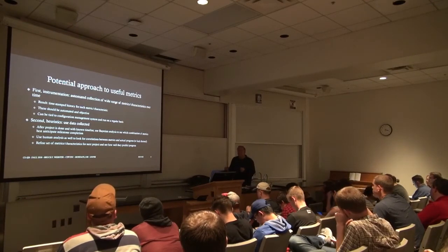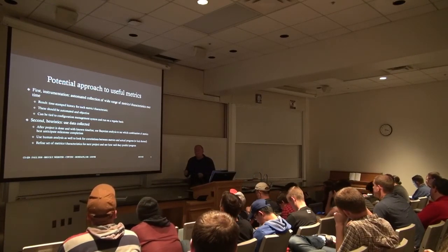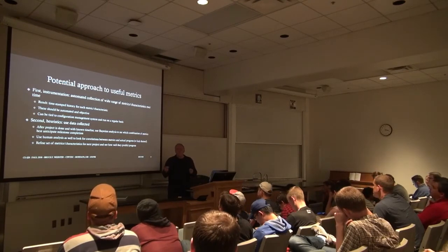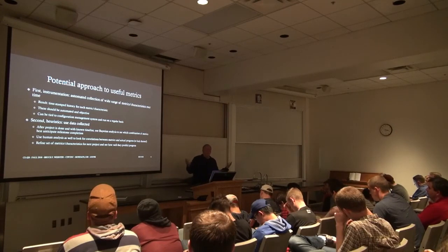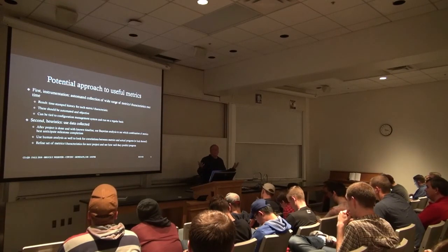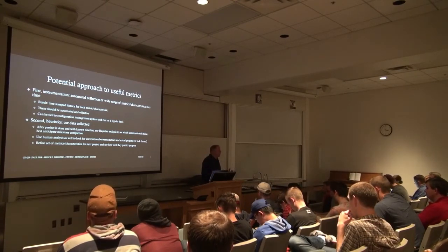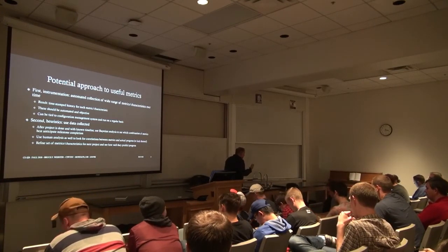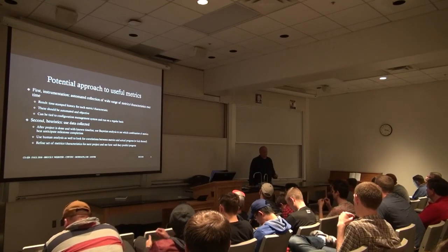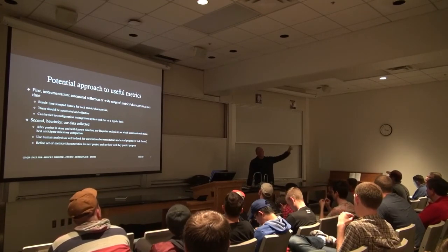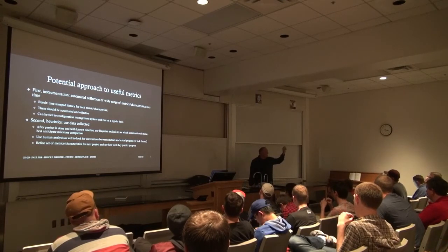Now, the priority says, how important is it for us to fix this before the next time? And that's usually a function of the impact on usability of the program and the frequency with which it happens. Yes, the whole program crashes, and this happens to me about once every 2 weeks. Okay, it's a pretty severe bug, but I can live with a crash every 2 weeks. If I couldn't, I wouldn't be using Microsoft Windows. Or it can be, well, there's a few miscolored pixels here. Well, the application happens to be Photoshop. No, I cannot have miscolored pixels on the image I'm editing in Photoshop.